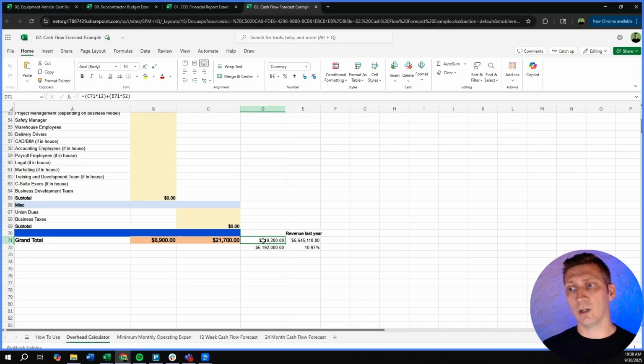And what I want to show people when I do this for them is this means that this $619,000, this company should be $6.2 million to be at 10% overhead. Because they only did $5.6 million, they were at 11% overhead. That's not a problem. It just means that on change orders, when you're only allowed 10 and 5 and you're making 13.3%, that really you're only making 2.3% profit. And that's if everything goes right. So that's the most important thing.